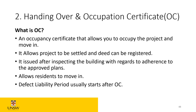The defect liability period starts after the OC. Once you achieve the occupation certificate, your defect liability period begins. For example, if you finish the job and reach practical completion but it takes six months to receive the OC, the defect liability period — which is six years for major defects — starts straight after the OC is issued, even if the building has been finished for a year prior.